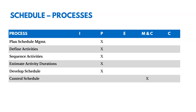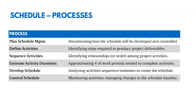There are six processes: five are in planning, and one is in monitoring and controlling. With Plan Schedule Management, we're documenting how the schedule will be developed and controlled — what estimation techniques we'll use and so on. Then we Define Activities, identifying steps required to produce deliverables, going from work packages down to activities. Then we Sequence Activities, estimate durations, develop the schedule, and then control it over time.